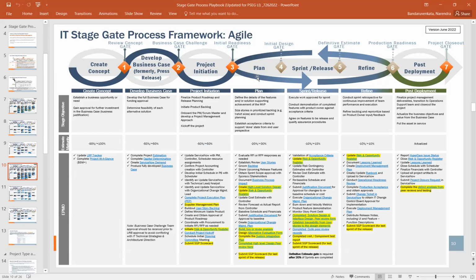So planning is nothing but where you plan all your user stories, sprint planning, and then you will be conducting the sprint user story grooming sessions, user acceptance criteria, etc. Move to the sprint release, you will be executing the changes and then getting them tested, going to refine mode. If you are delivering something into production, act accordingly. If you are not, you are staging something, give a demo to the business, and then go back to the planning stage till you make this iteration to see that some changes are being moved into production, which we basically call it as a release, right?